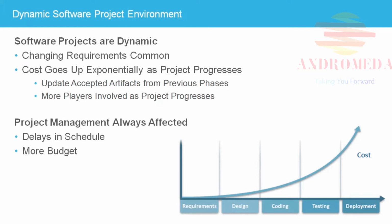In severe cases, the design defect could require changes to the software architecture, affecting large portions of the system. These types of changes found late in the project delay the scheduled due dates. Project management must then push out the schedule to accommodate the rework and work with stakeholders to increase the budget to pay for it. Delays in the schedule affect release dates set by product management and marketing and coordination with departments supporting deployment.